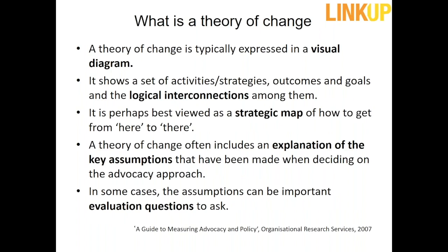So theory of change, well, I've mentioned this, and as I mentioned, this is something which is now fairly common in most projects. And the theory of change, in my experience, is usually able to be written on one page, but with about, say, 3 or 4 pages of text, maybe 2 pages of text to accompany it. But it can take quite a while to develop a theory of change. And the last time I did it with a group, it took us 3 days to generate a theory of change for one particular project.